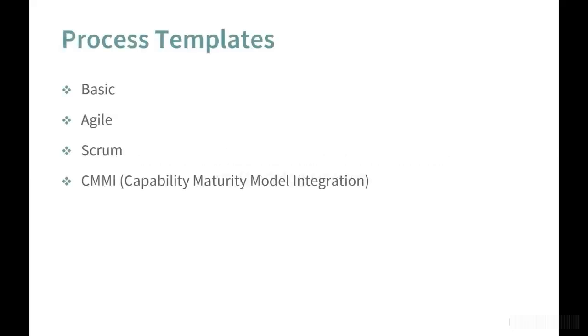To create a flexible system that accommodates diverse software teams, Azure Boards must understand the specific tracking needs of your team. What is tracked depends on what process methodology is used. For example, an Agile team will use different terminology and workflows from other types of process systems. To address this, Azure Boards supports 4 process templates: Basic, Agile, Scrum, and CMMI. Each one caters to a specific target audience and provides a variety of predefined work item types and workflows. Each DevOps team can pick the process that fits their style.